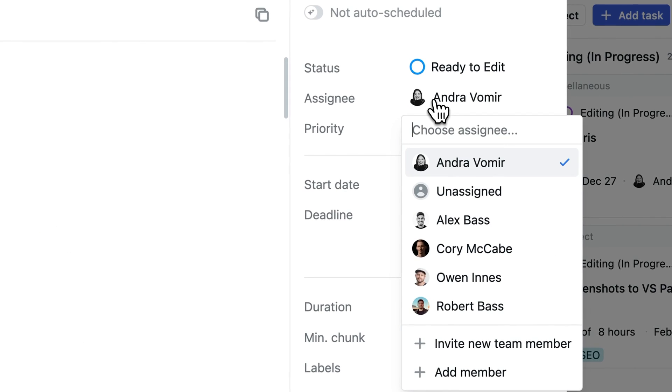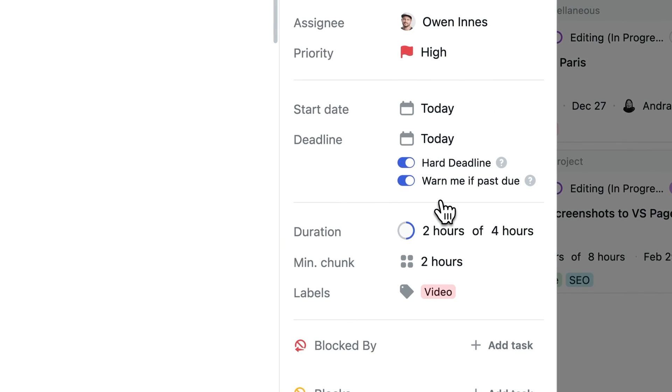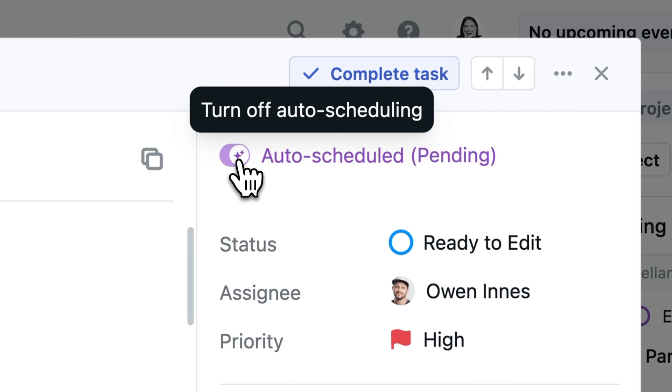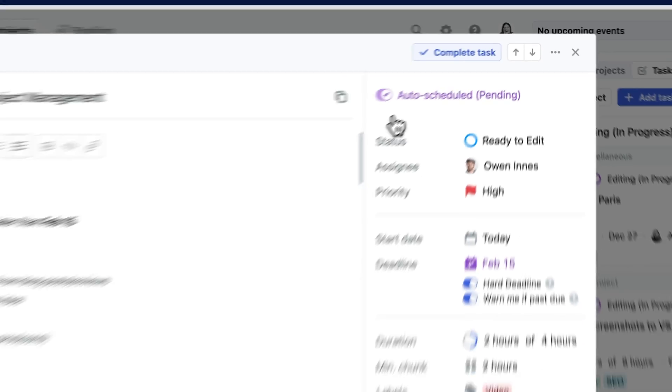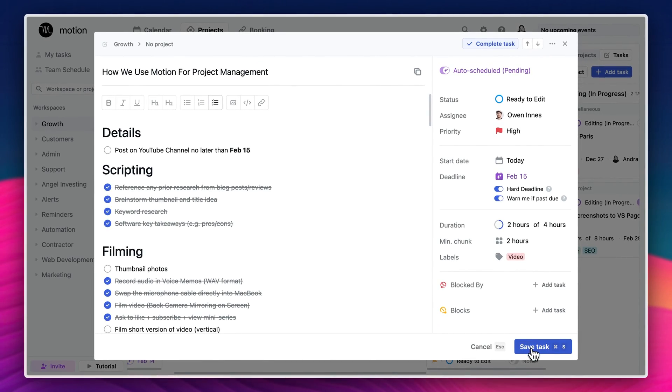And then assign it to our video editor and also auto-schedule it so the task appears right on his calendar. This makes collaborating so much easier. Our video editor knows that I've done my part of the task and it's his turn to take over and it reduces those manual check-ins and status updates because it's all being done through Motion. And of course, if you're using Motion on your own and not as a part of a team, then still set up statuses because they're super powerful to help you move projects into completion.